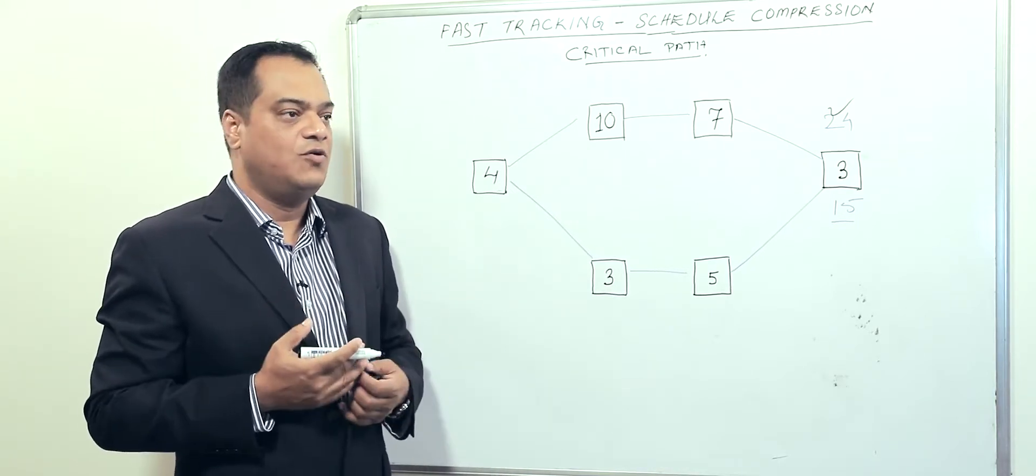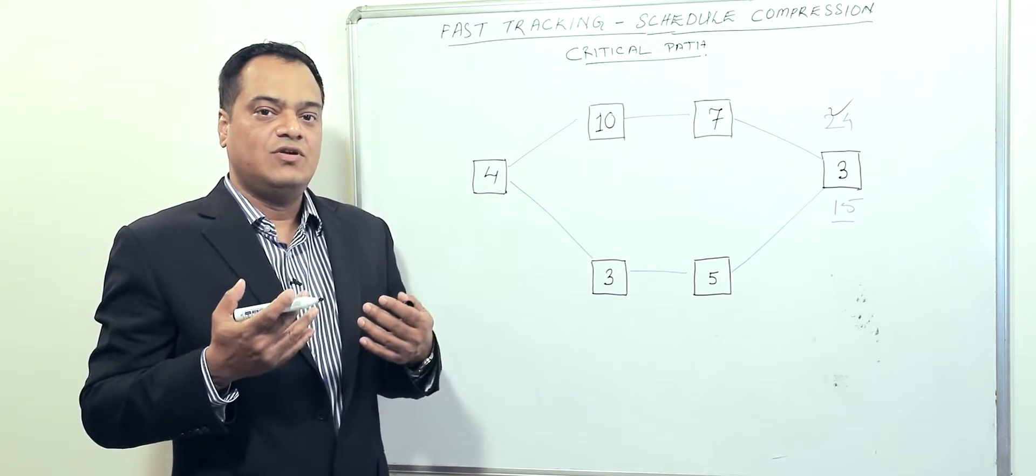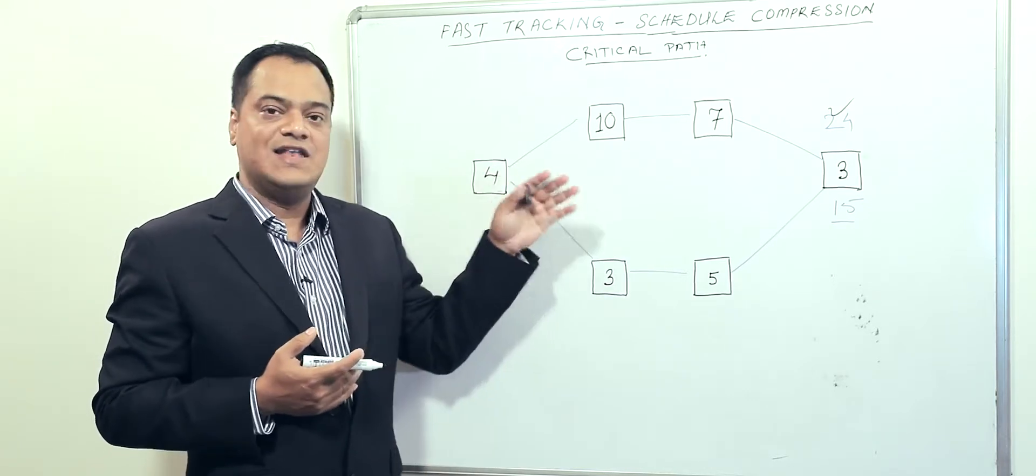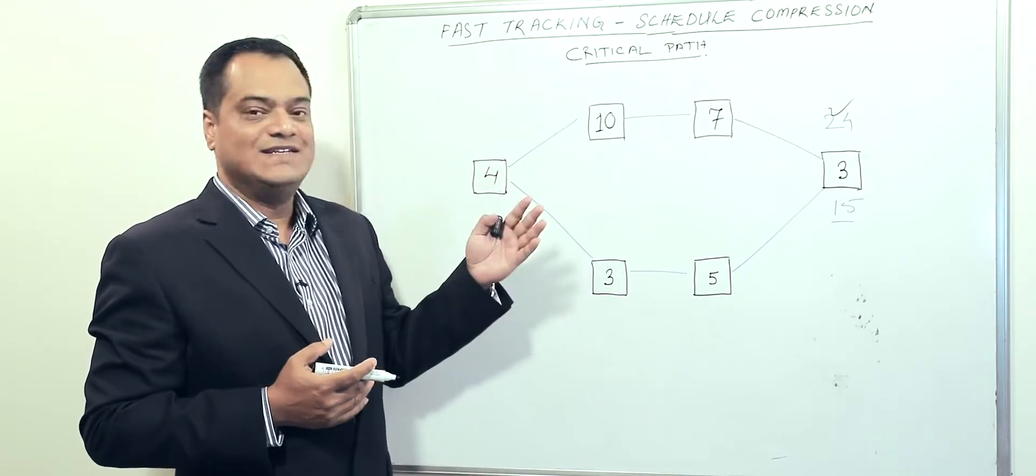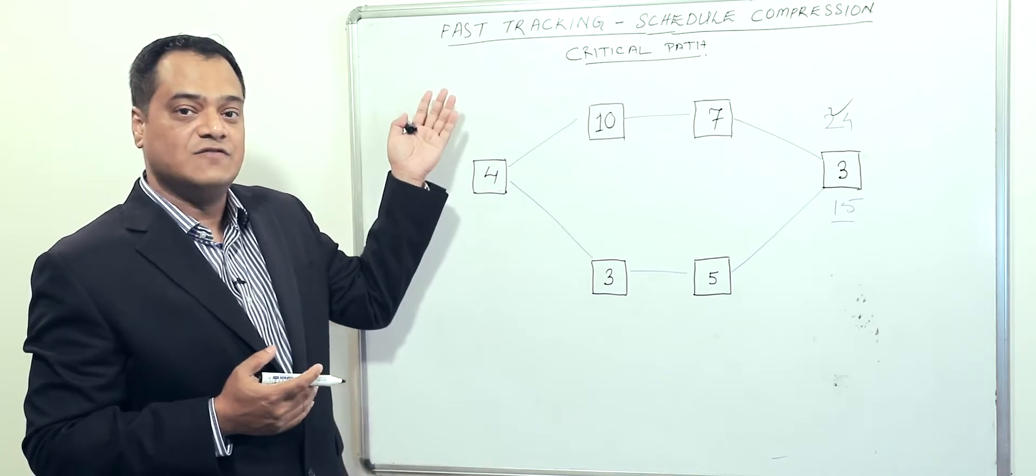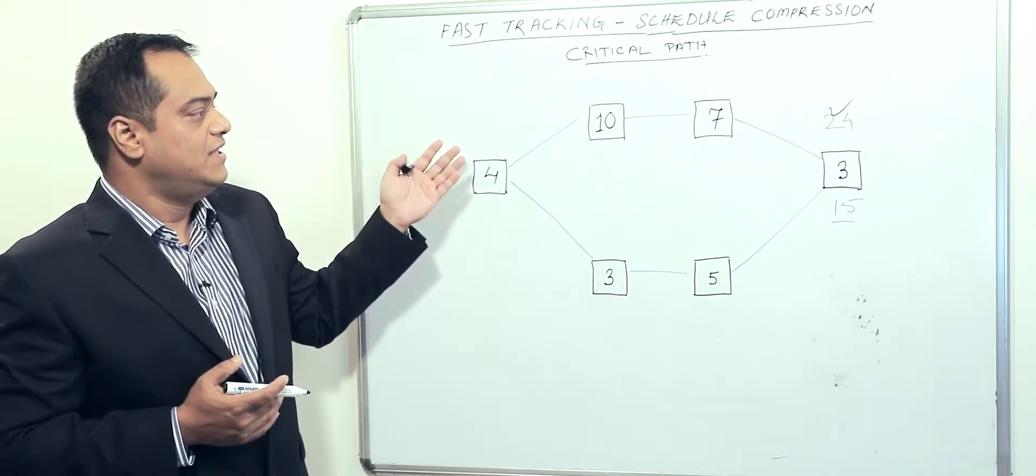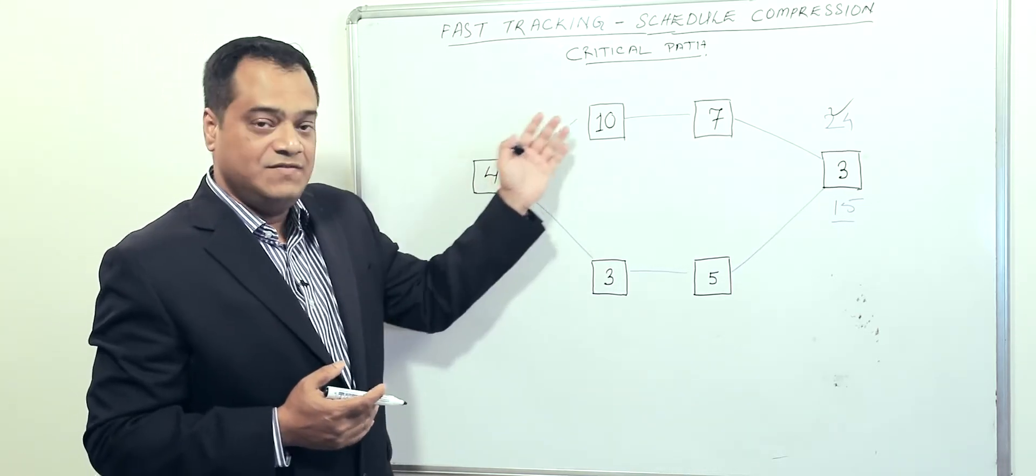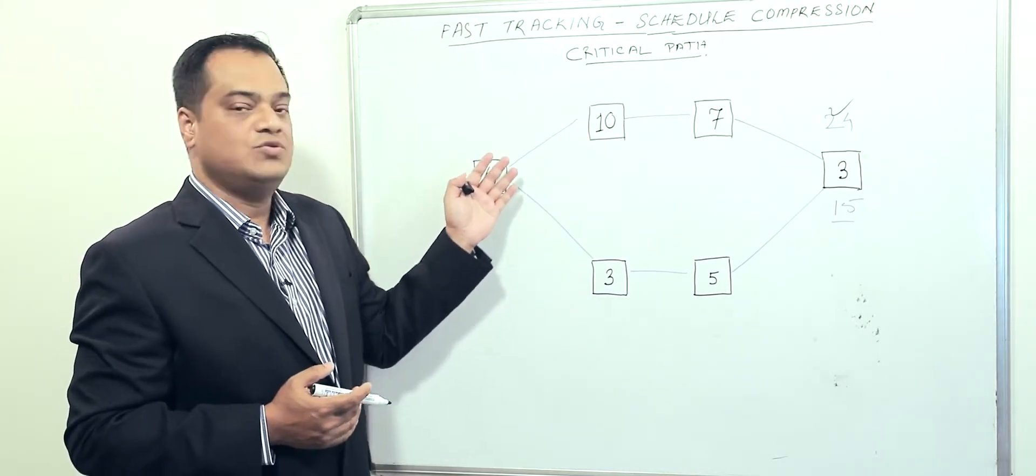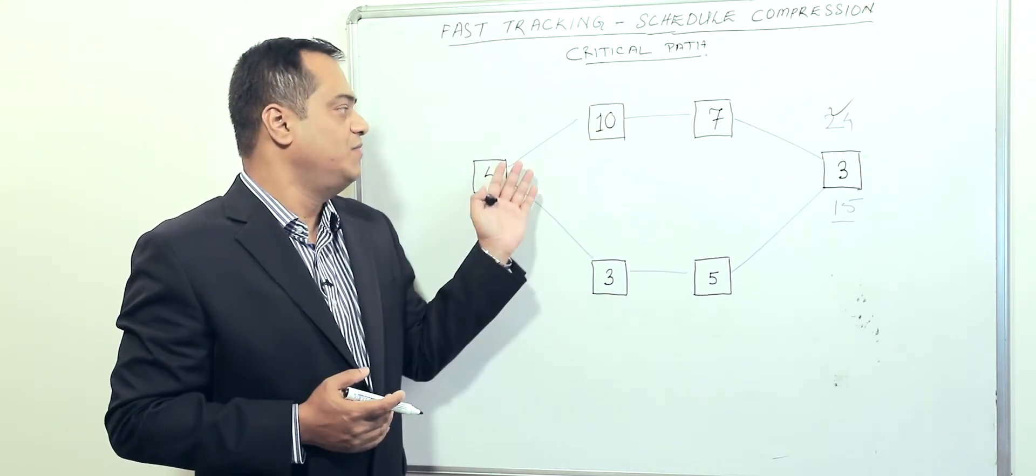It needs reworking the entire schedule. One technique is fast tracking. Fast tracking basically means the activities that were supposed to run in sequence - one after another - we try to take one activity outside the sequence and run in parallel.